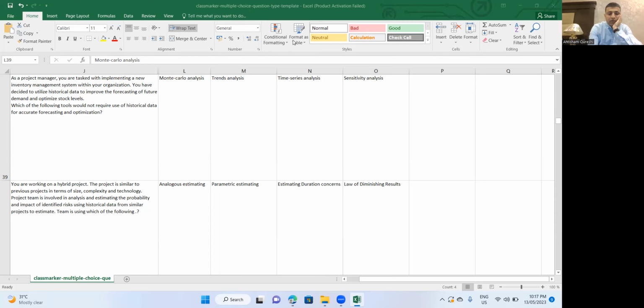So Monte Carlo does need an input which is based on historical information. If there is a risk around the estimates for activities, and all the activities have a pessimistic duration, optimistic duration and most likely duration, there is a lot of variance around what could happen with this activity.